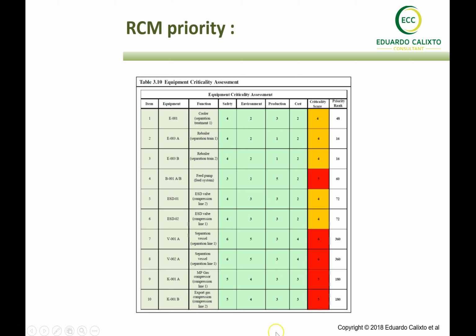Okay, so sometimes it's not clear how long it takes to carry out RCM for entire process plants, and let's say that is real critical. Let's say that we can, in an optimal case, carry out an RCM for a pump concerning all the components in one day, and of course the other pumps in this process plant will be very similar.